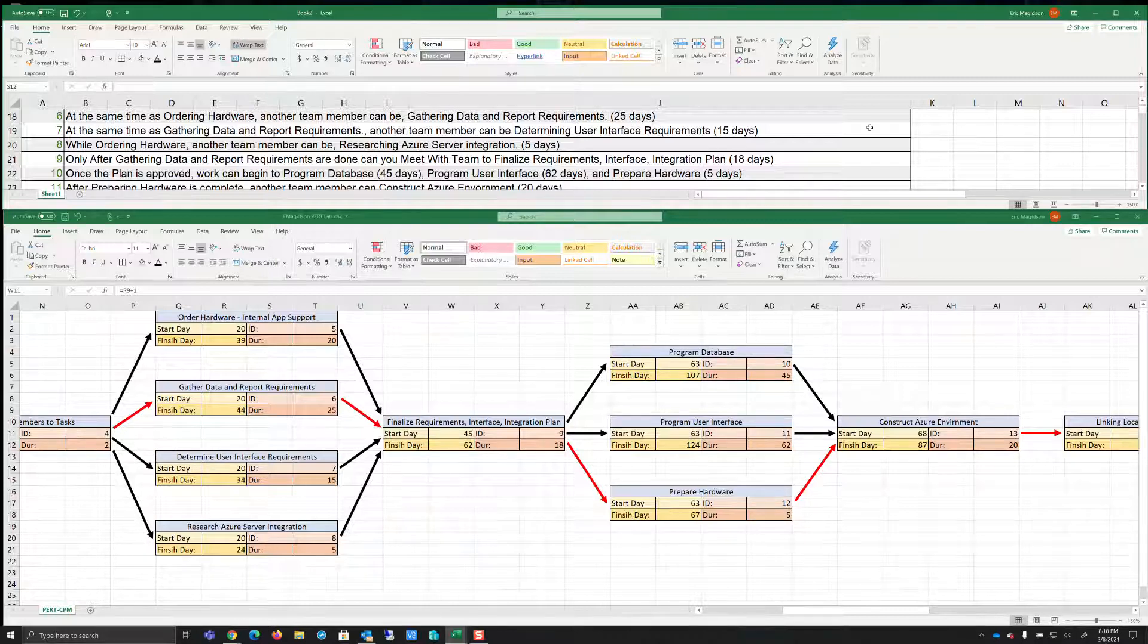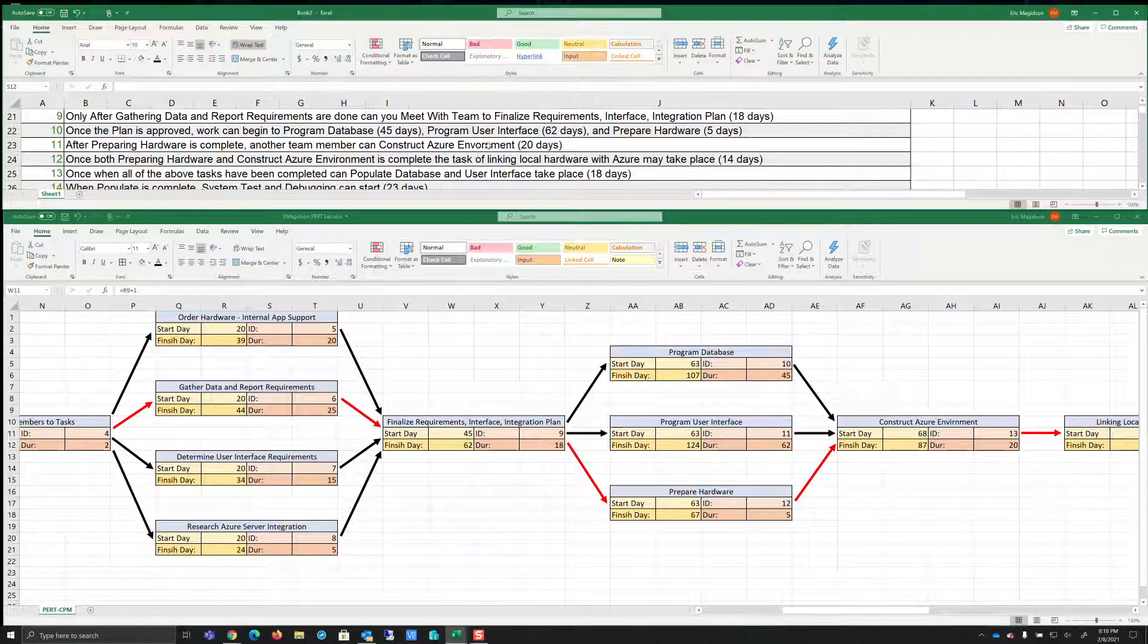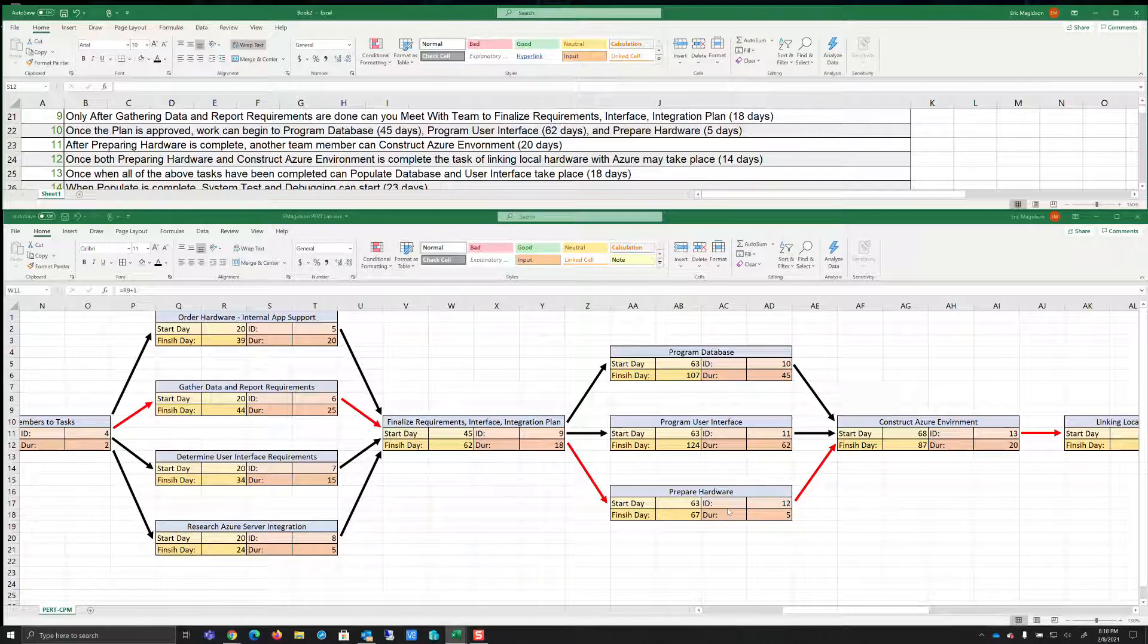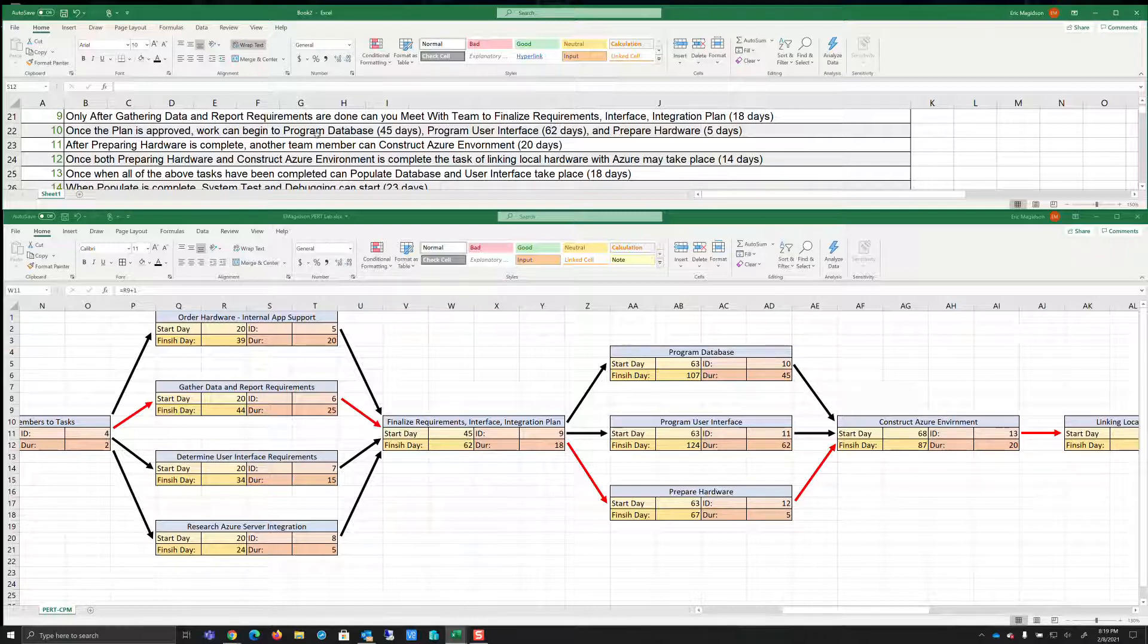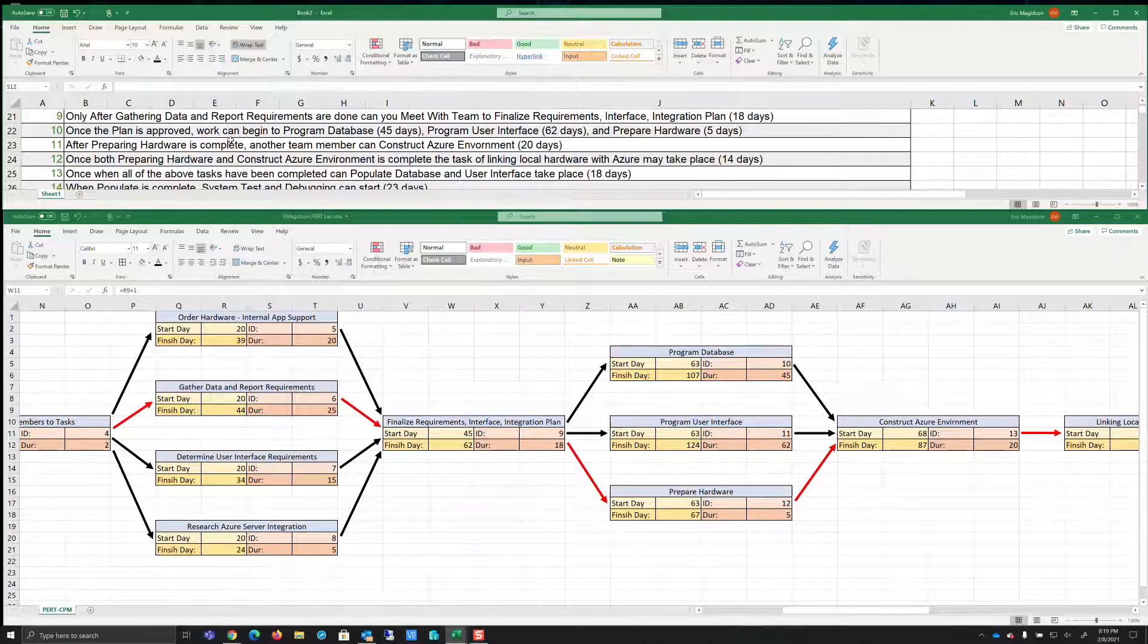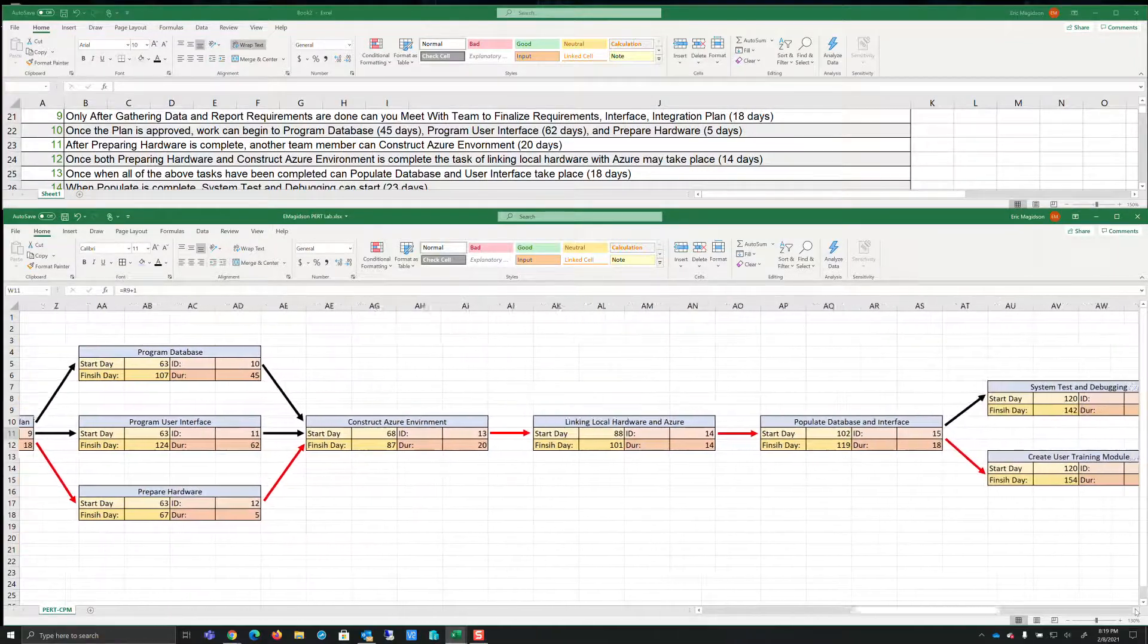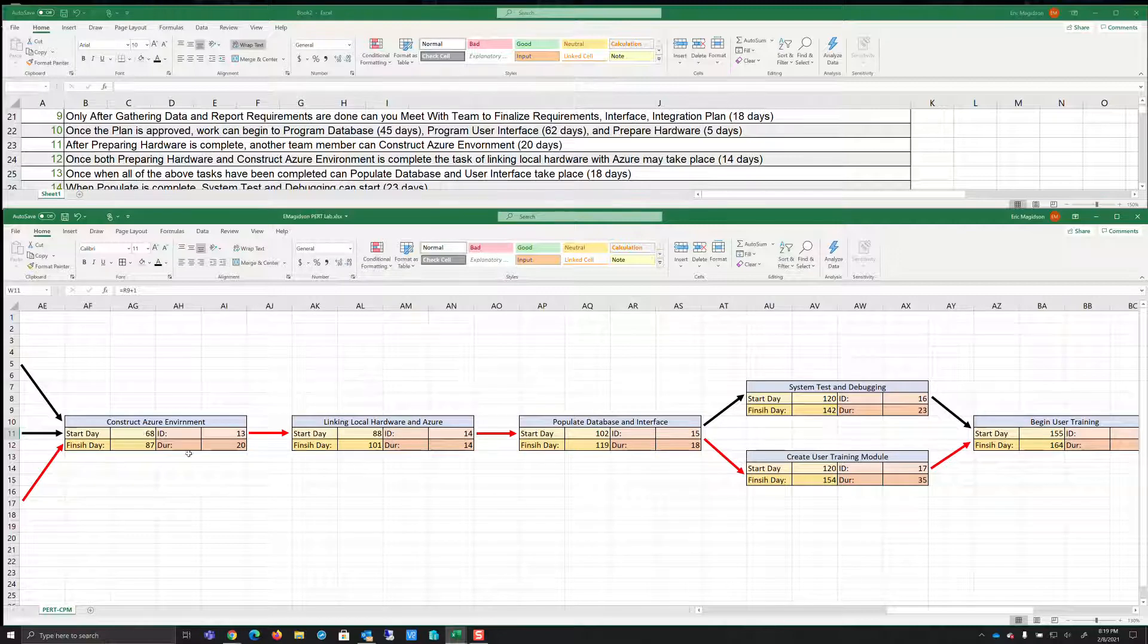However, notice what it says here. It says after preparing hardware is complete, another team member can construct Azure environment. So although this seems to be our longest time through, we realize that we don't have to wait to do the construct Azure environment until after the program interface. We just have to wait till the hardware's up. So once the hardware's up at day 67, we can begin this at day 68. So that might have been a challenge to you all. And that's why we need to be able to read and assess very carefully. So another team can construct Azure environment. We see that we're going to move on from that.